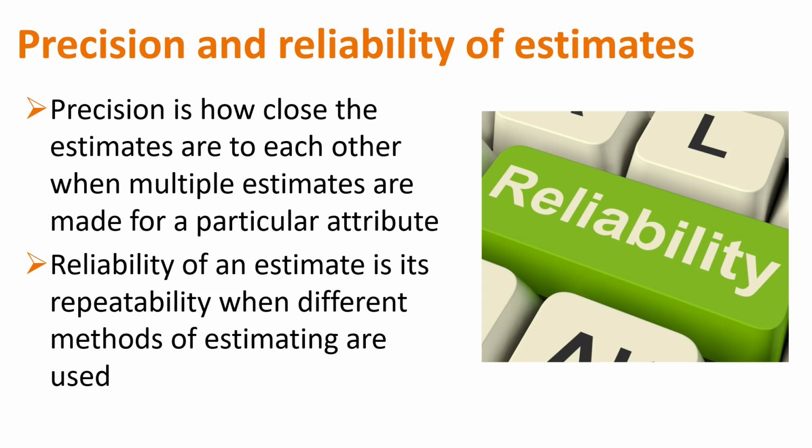Reliability means, if we use other estimation techniques, are we getting the same kind of result? So is everyone on the same page? How precise are we? That tells me how much we know what we're talking about and how much we all understand the thing we're looking at. And then if I do that with other estimation techniques, do I come up with something similar? It's important. So precision and reliability.